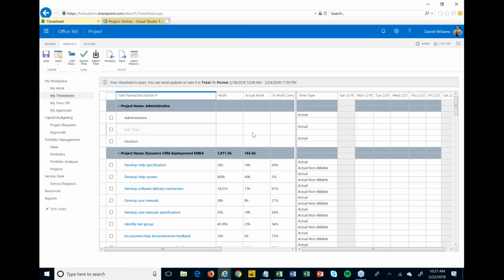There's actually an auto submit option as well. If people are only working on Agile work and they don't need to put any of that else in, we can auto submit it for them and have that go through one consistent process and have one timesheet system instead of multiples, and not require people, most importantly, to do duplicate entry. We all know it's hard enough to get people to do their timesheet once, let alone twice. It can be really, really challenging to make sure that happens and then therefore get good data out of it.